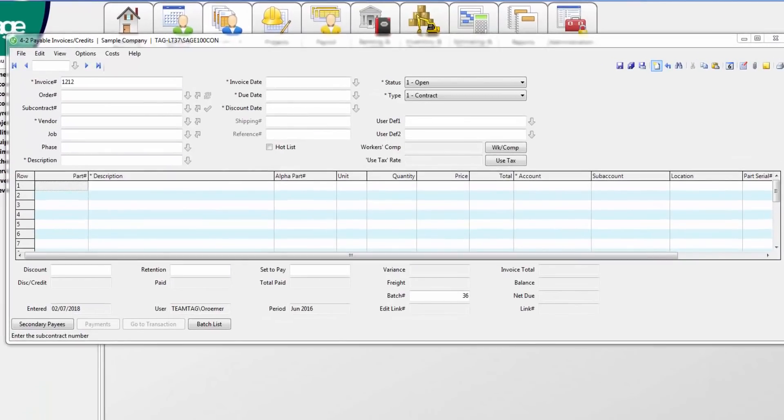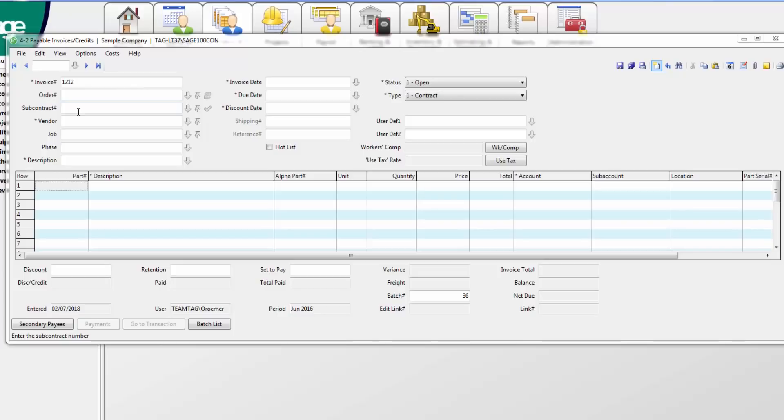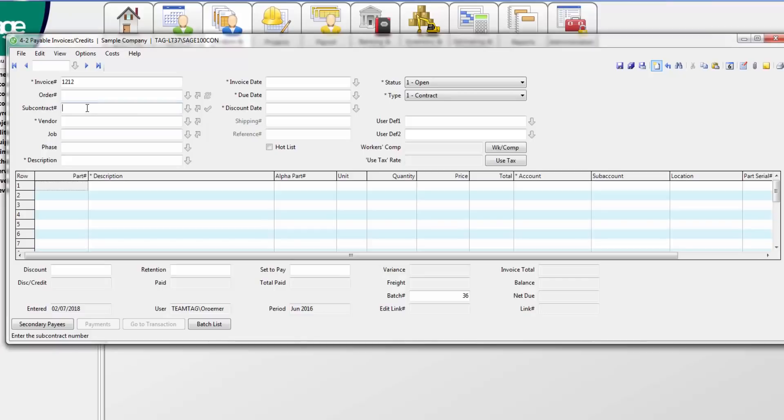Committed costs are also connected to accounts payable. When entering an AP invoice, notice how I can enter a purchase order or subcontract number in the fields. Once I enter this information, it pulls my PO or subcontract agreement into the accounts payable invoice. Notice as I add this invoice to the subcontract agreement.